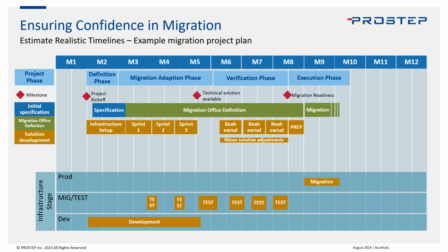One side note to that, always plan for a separate migration infrastructure. So don't use the same infrastructure that is currently available from the deployment project. There will be a lot of data model changes. There will be a lot of general changes on this infrastructure. The data migration project needs a stable environment. So always establish a migration environment to migrate the data in. That makes life way easier. And when there are updates, bring it into the migration environment in a structured way with the coordination of your IT people.